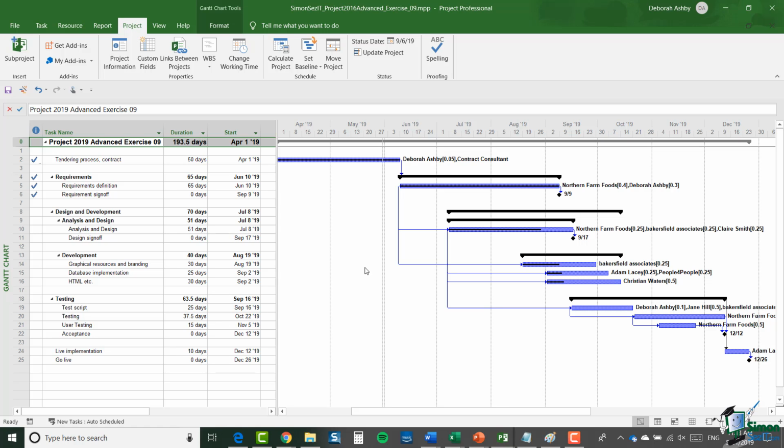So just to recap, clear any filters, clear any groups, apply Gantt chart view, filter on incomplete tasks, group by critical, but with the hierarchy maintained, and somewhere in there, make sure that the timeline is shown. And having recorded and edited as necessary, just make sure that it runs from 2 or 3 different starting points. So say from the resource sheet and maybe from the network diagram view. My answer to this is in exercise 09 answer.